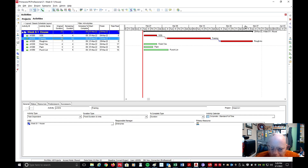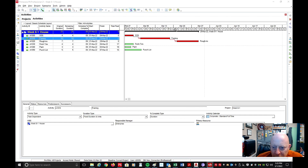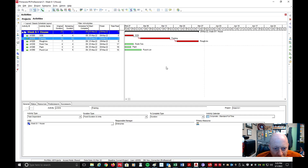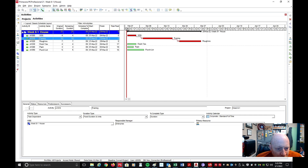I was looking for Saturday and Sunday. On the screen you should see a gray vertical line that goes up and down — that's on Saturday and Sunday. The schedule is set up for calendar work days, meaning Monday through Friday. Anything on Saturday and Sunday is grayed out. So if you have an item like Punch List — it takes five days but it starts on a Tuesday — Tuesday through Friday is four days, and the fifth day is the following Monday, and it goes through the weekend to get there.